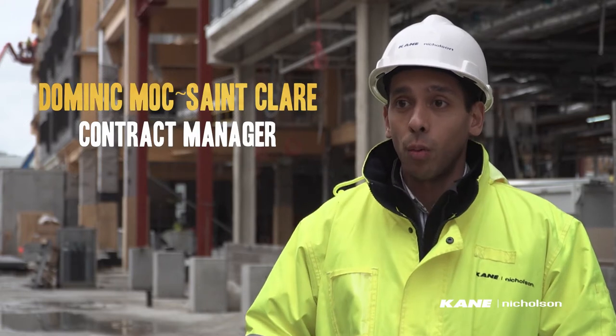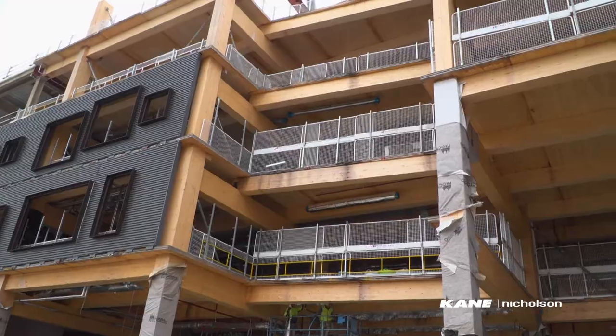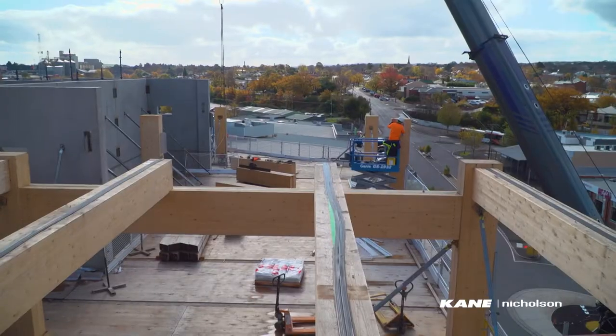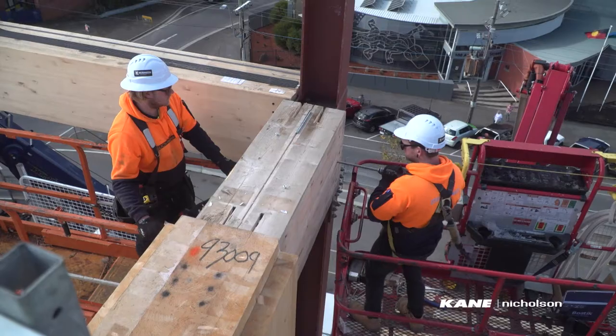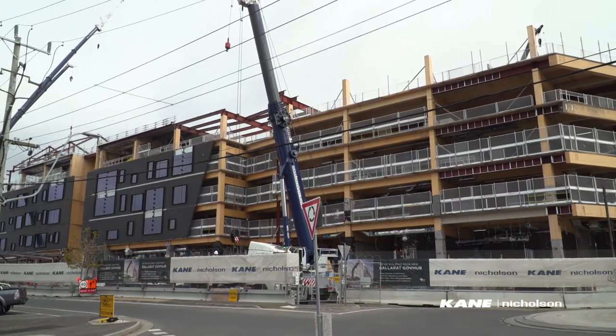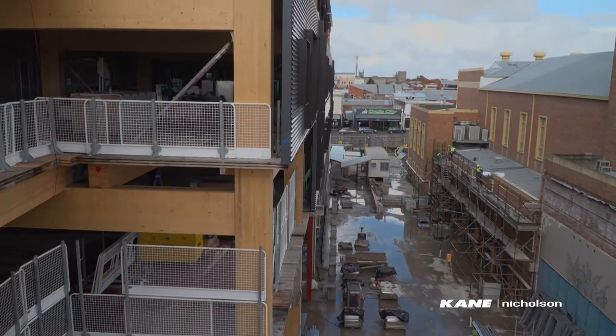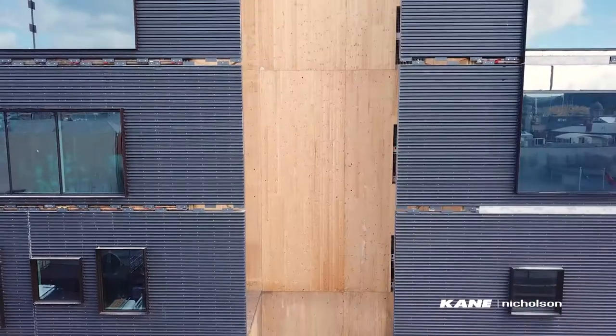We've just finished installing our timber structure. That's 1400 timber elements that we've installed and completed. We're also installing our facade panels, which will have the zinc cladding with a standing seam feature look on top